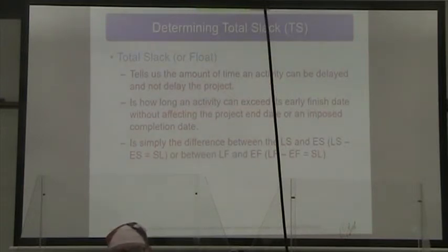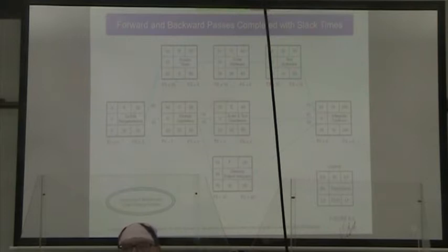We want to know definitely how much slack we have in the project, right? Because when we look at this, we say, assigning the team, we've got slack, coding the software, testing the software, we got slack in all of those, developing the patent request. Well, if we have a small team where we can only devote a few people to each critical work package, that gives us some flexibility.